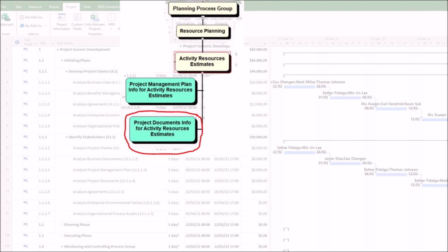Fourth, team morale and burnout. Consistently being under-resourced creates an unsustainable workload for the team, leading to burnout, high turnover, and further exacerbating resource shortages. Fifth, increased project risk. The project becomes highly vulnerable to any disruption. A single sick day, a piece of equipment breaking, or a minor scope change can derail the entire plan because there is no resource slack or proper contingency.